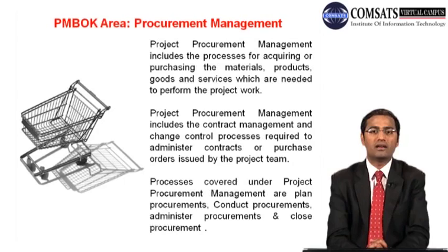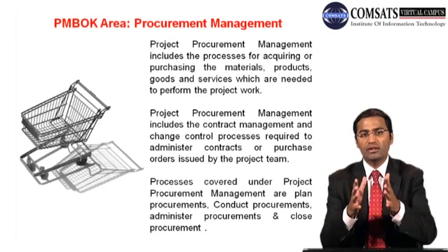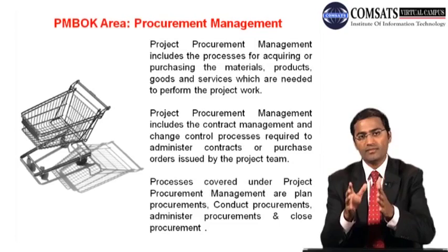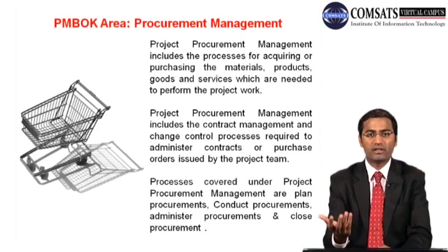Accordingly, five chairs will be completed in 5 months, but the time fixed by the top management is very tight, and we have to complete our project in 3 months. So what will we do then? Now the question is, should we go and hire our team again, or should we do something else? My answer is, well, we will do something else. And what is that? We will outsource that part of the work to another organization. So this is one example of how and why we should procure something: procurement of goods, procurement of works, procurement of services.